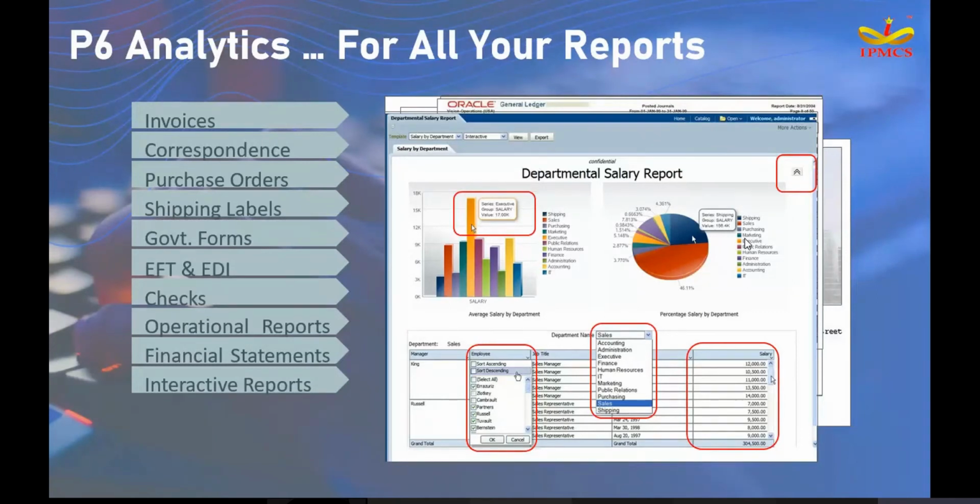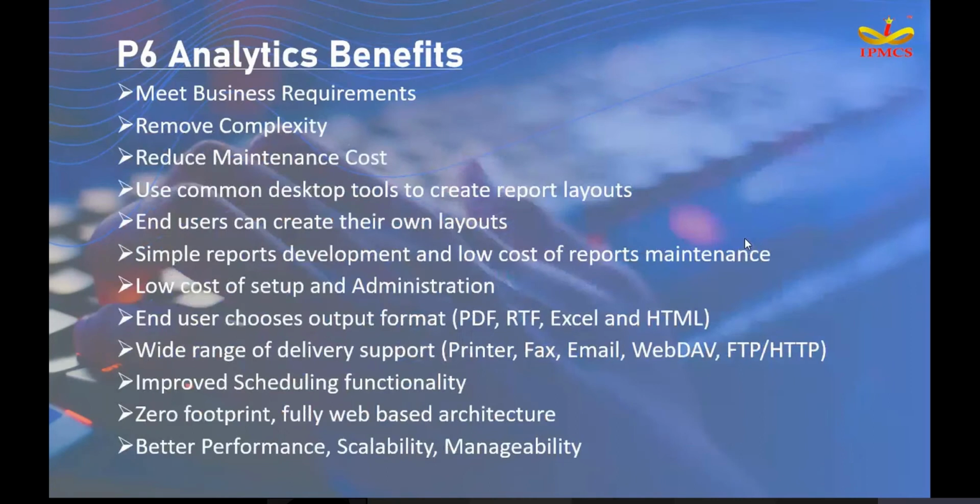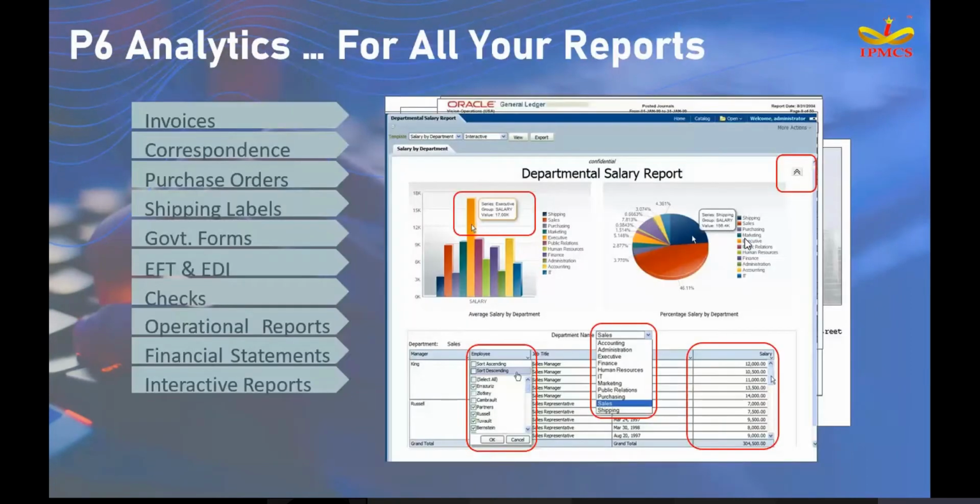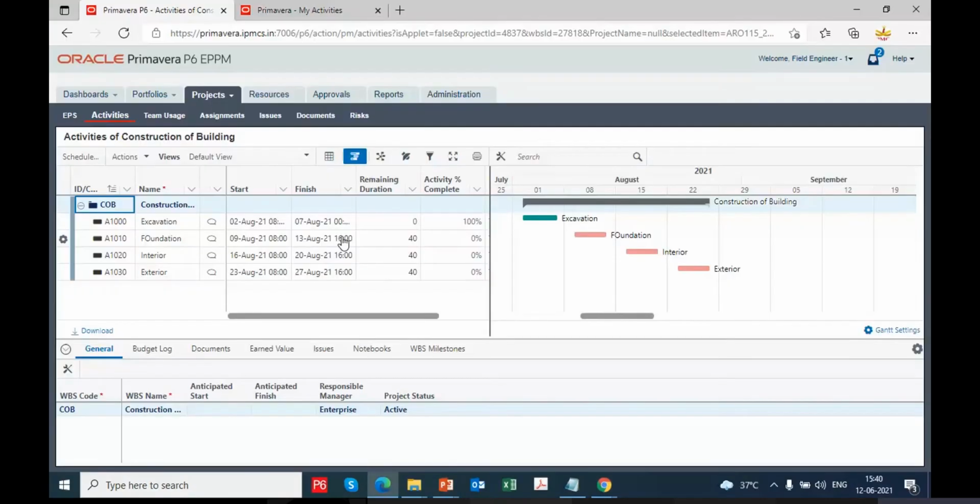Let's see how to generate a sample report in P6 Analytics. If you are purchasing only P6 EPPM, you will have the dashboard tab, portfolio tab, projects tab, resources, approvals and administration, whereas this reports tab will not be available. If you want, you can purchase P6 Analytics as an add-on. If you purchase and install it, then this reports tab will get enabled. So now you can go to the reports tab.